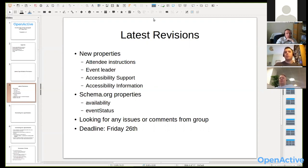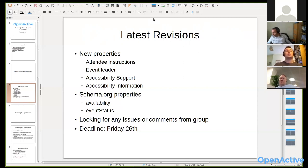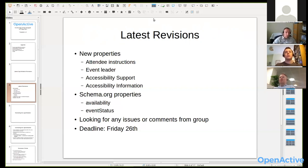Moving forward, I want to make sure that anything under discussion or review by the group is in the editor's draft initially, and then when we're happy with it, we push it out into the candidate spec so people have a slightly more stable specification to implement against. I want to get into a habit where, once we've agreed on changes that go into the editor's draft, we try to review those on our next hangout, or at least set a two-to-three week review period to get any comments — otherwise it will be pushed out.